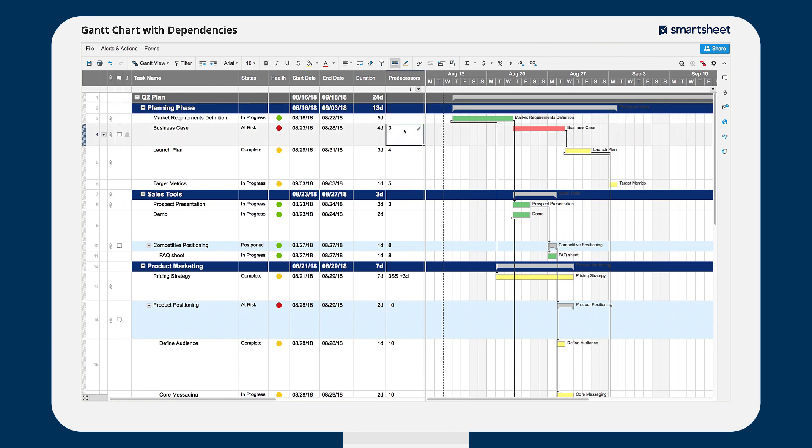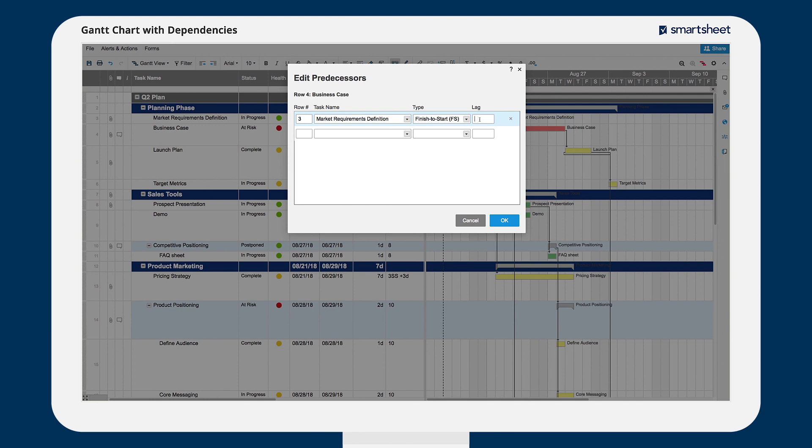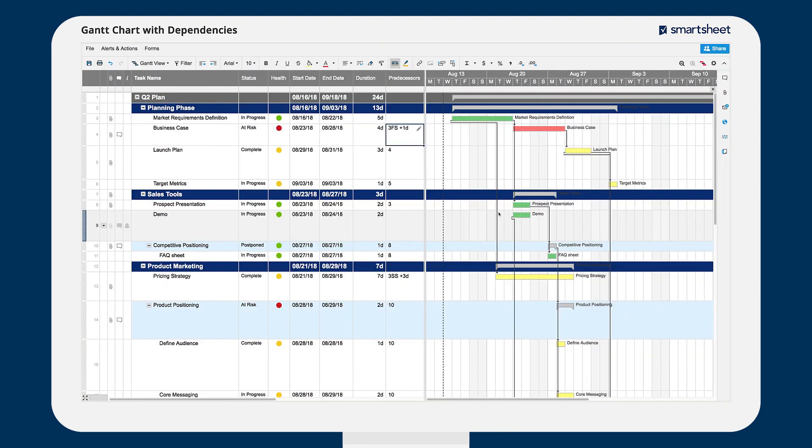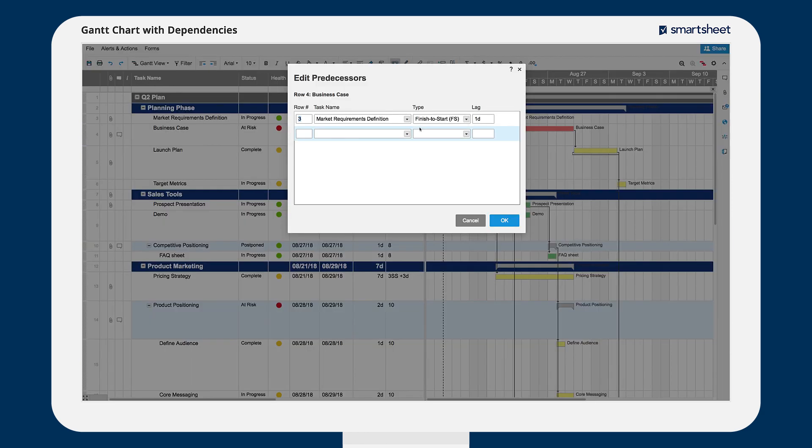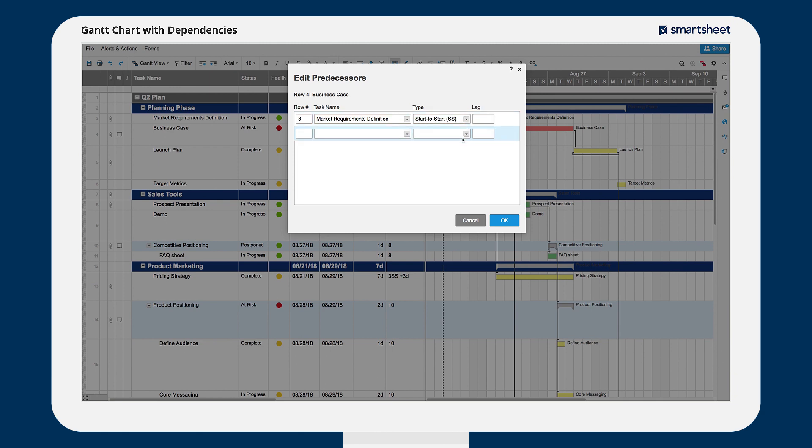To edit predecessors, click on the small pencil icon. Here, you can change the amount of lag time between tasks and can also change dependency types. For example, you can create a start-to-start dependency by modifying a dependent task to start at the same time as its predecessor.